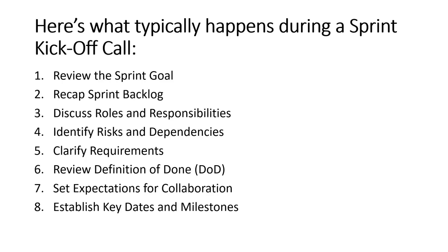We have identified points, and the walkthrough of the user stories has already been done with the solution architect and technical architect, and there are no open questions, and they understand the functionality of each user story, and the user acceptance criteria is also defined for each user story. And in this meeting, we are discussing among all the team members. All the implementation team members are there and the QA team members are also there.